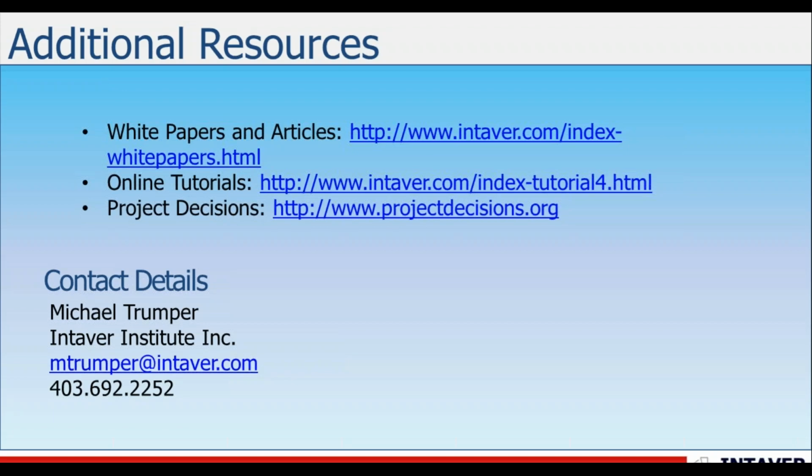One of them is that they might be working on multiple projects, key or critical resources working across multiple projects at one time, and there's going to be an availability issue or availability risk with that. If you believe that access to that resource is going to cause delays, you can assign that delay type risk to the resource rather than the activities that the risk is associated with.